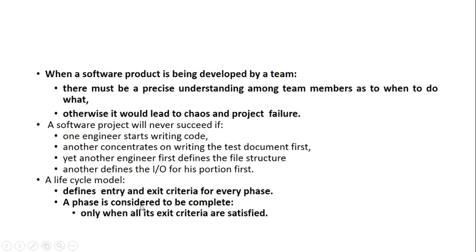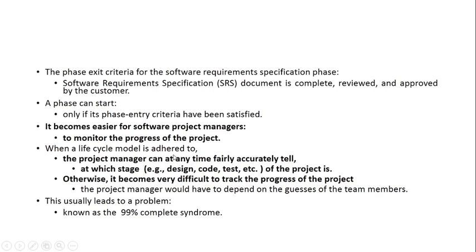A phase is considered to be complete only when all its exit criteria are satisfied, that is, the document is released. The phase exit criteria for the software requirement specification phase: SRS document is complete, reviewed and approved by the customer. It's not that you only prepare the document and we say it is completed. No. It must be completed, reviewed and approved by the customer, right?